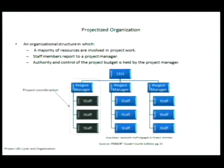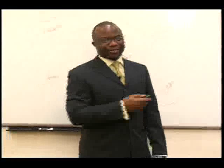And then we've got the projectized organization — project manager heaven — where the project manager has almost total authority over every resource needed. A project in a projectized organization will be run to the highest degree of project management. This is a structure where a majority of resources are involved in project work, staff members report to a project manager, and authority and control of the project budget is held by the project manager.